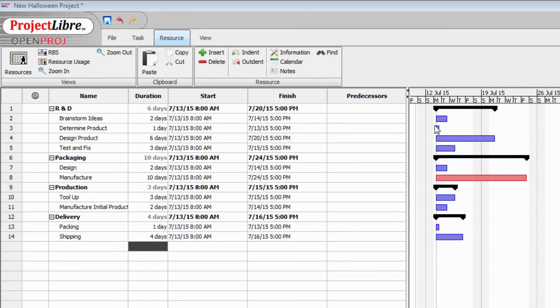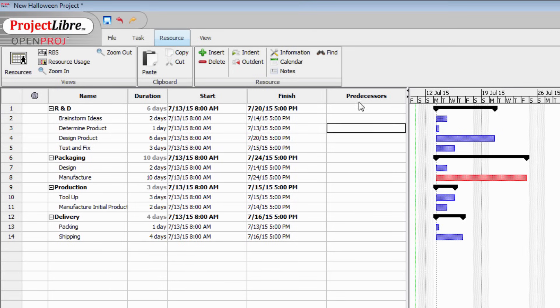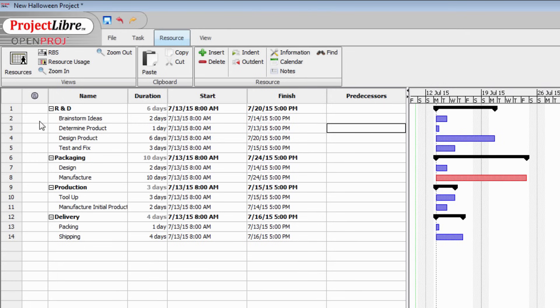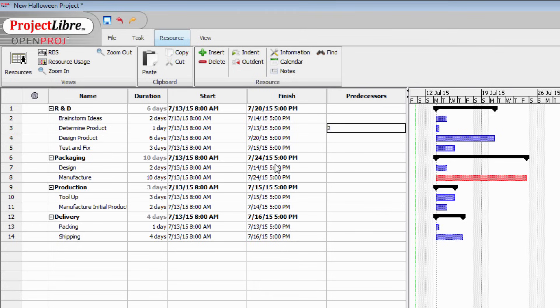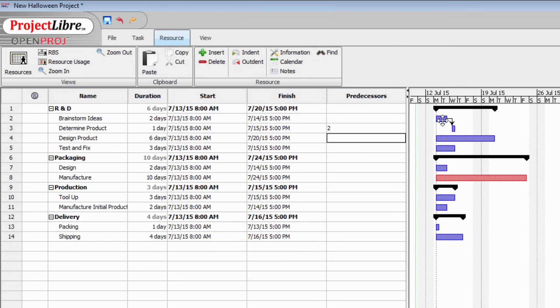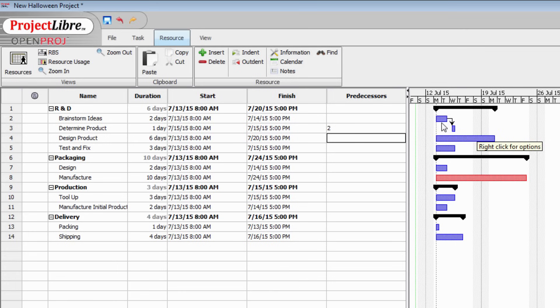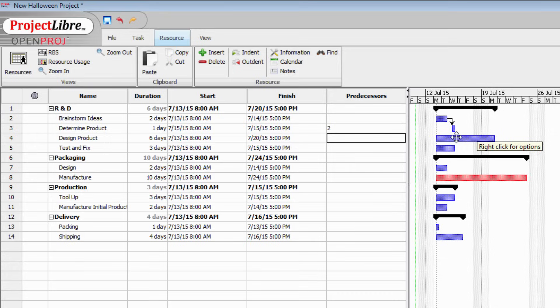There are a couple of ways of setting up dependency in ProjectLibre. One of them is clicking in this predecessors column. We're saying that we can't determine the product until brainstorming ideas is complete because brainstorming ideas is in row two, then we just type a two in here and press enter. And the dependency is created for us. Now this is what is called a finish to start dependency. Upon finishing brainstorming of the ideas, we can then start determining the product. And most of your dependencies will probably be of this type.